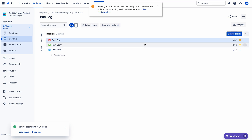I am unable to rank because ranking is disabled — the filter query for this board is not ordered by ascending rank. So the first thumb rule is: the filter query which was used to create this board must have 'ORDER BY rank ASC'. Even if you use descending rank, you cannot change the order of the issues. The filter query must be ordered by ascending rank; then only you can change the priority of the issues manually.